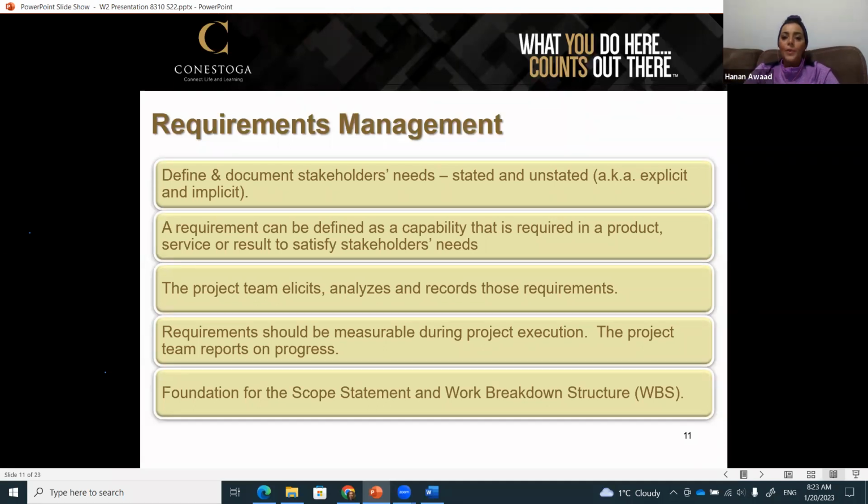So for example, let's say in the website, something that's measurable. Photos and pictures that we are using, the resolution should be a certain value. So this is a requirement, and this is a matrix attached to this requirement.